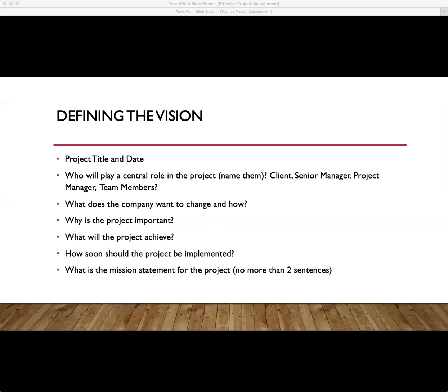Defining the vision. Assuming that you've decided that the original idea has potential and is feasible to become a major project, now you can come up with an overall statement that summarizes the vision of the project. This is a good time to involve the key players informally in the process and invite their feedback. Once this is in place, arrange a meeting with all the key players and ask for their comments so you can fine tune the summary where necessary. By making sure that the objectives of most participants are satisfied, you guarantee their continued commitment to the project.